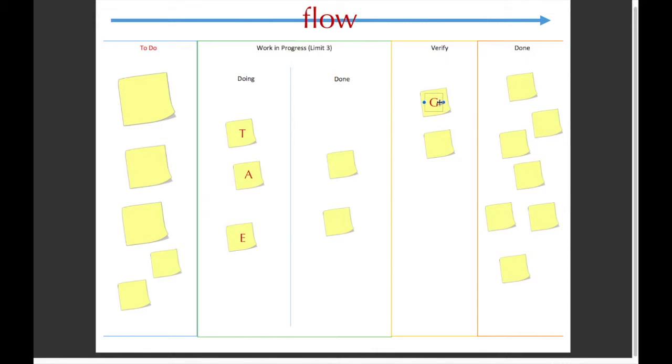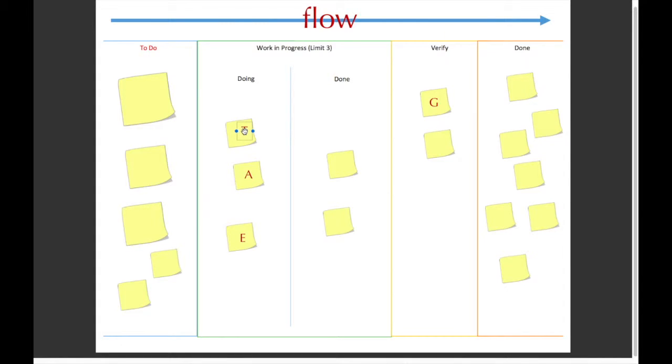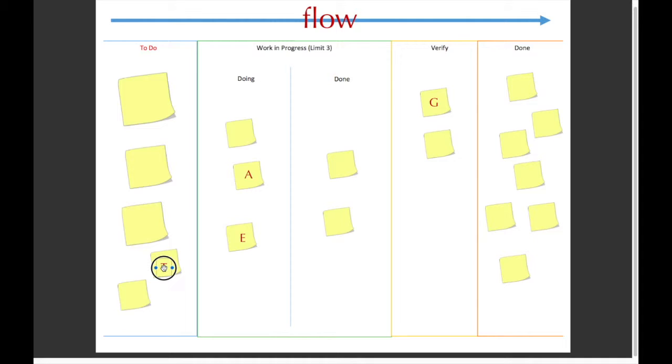Once he's done, he can move it over to the done, so that means he'll be moving his sticking over here. And so T can either go back over here and grab another task to pull to the doing.